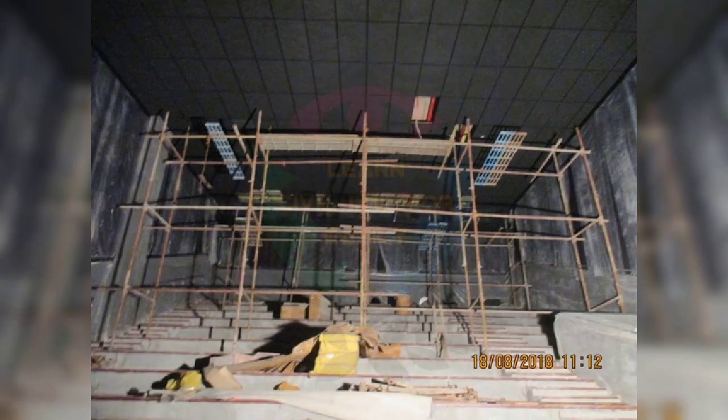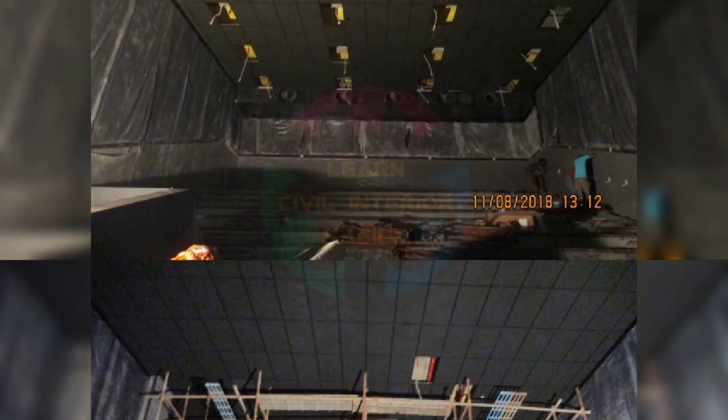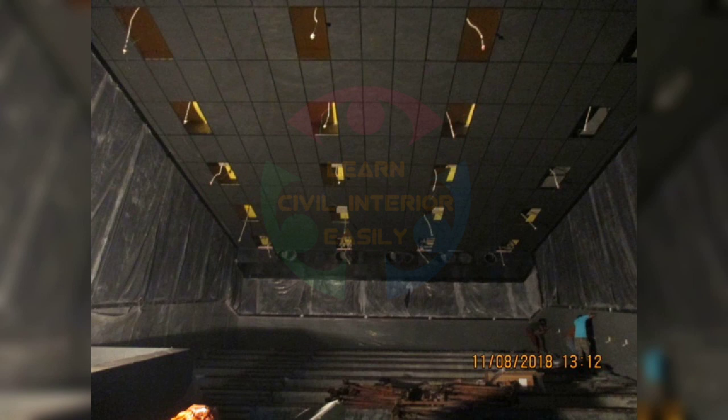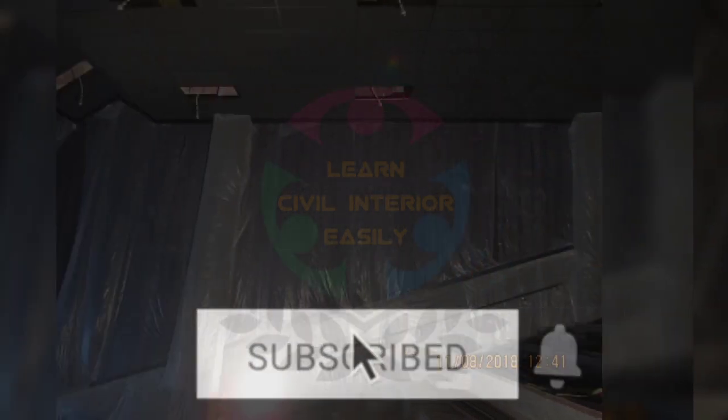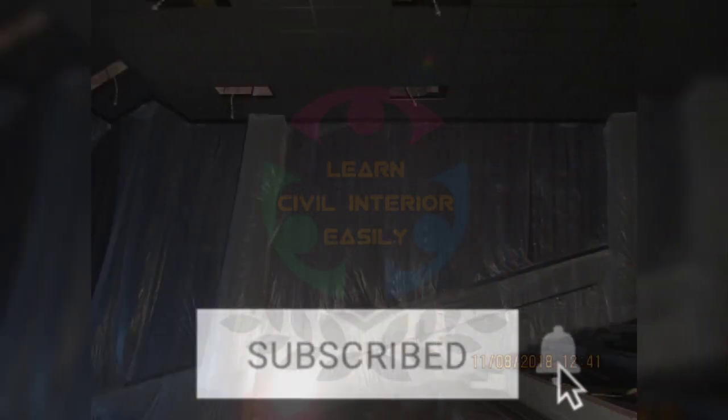And the next one is completing the ceiling, and the MEP lines like sprinkler or FA, fire alarm, all those things need to be closed in a proper way and aligned in a proper way. Firefighting is a different task. Firefighting has sprinklers, so the sprinkler bulbs also need to come in the tile, which need to be completed by the firefighting team, because they will mark it on the tile and align it on the proper center. When we look from a straight line, it should look in a straight line. If it goes here and there, then it looks sharp.